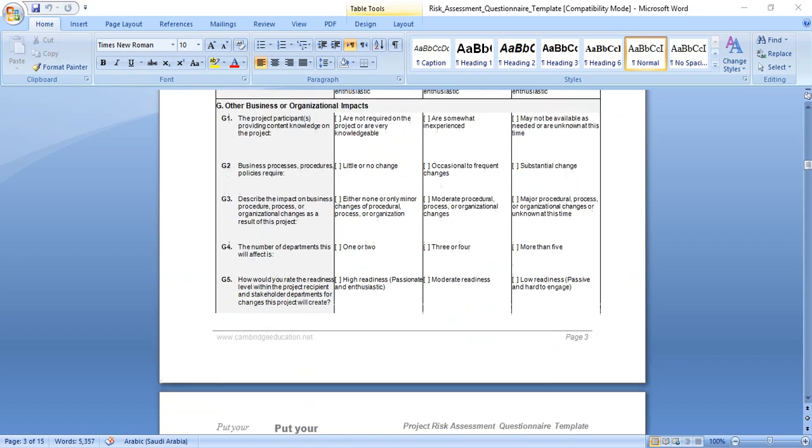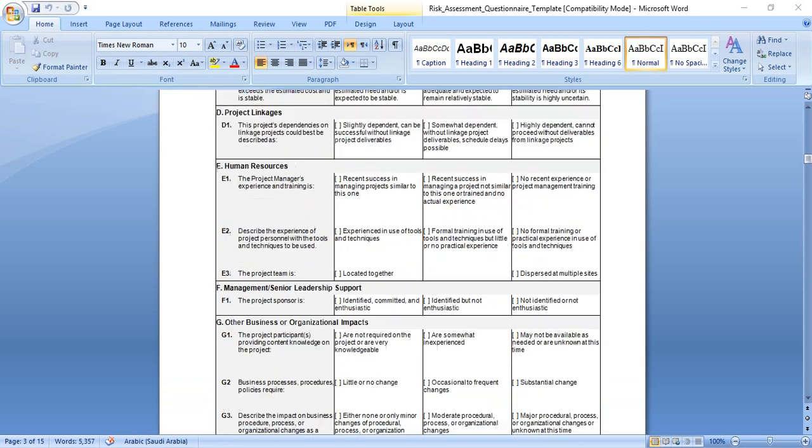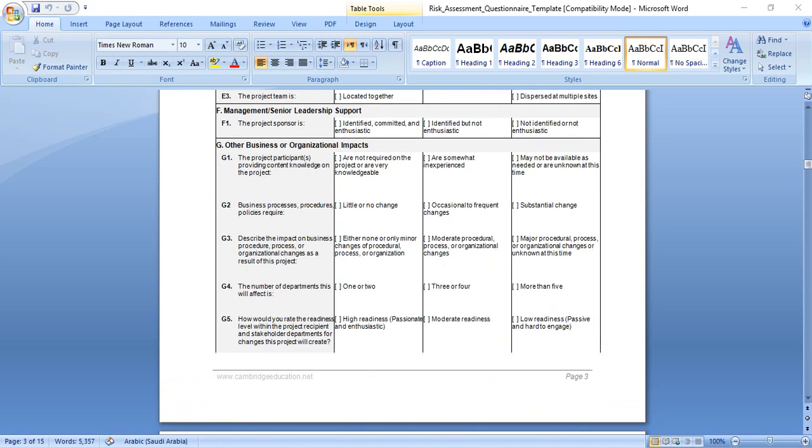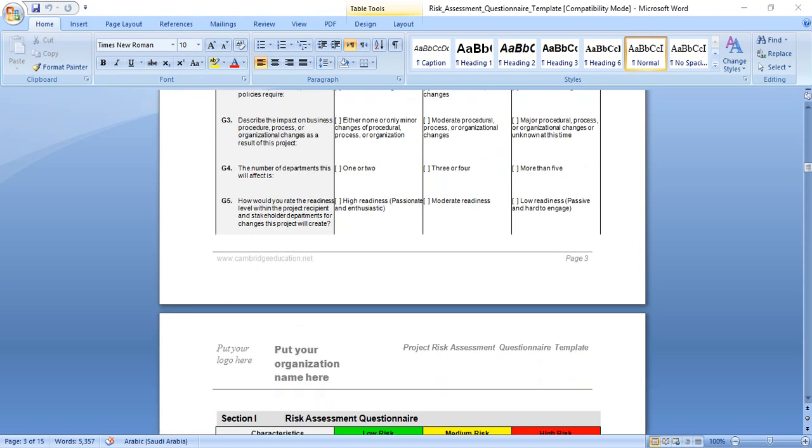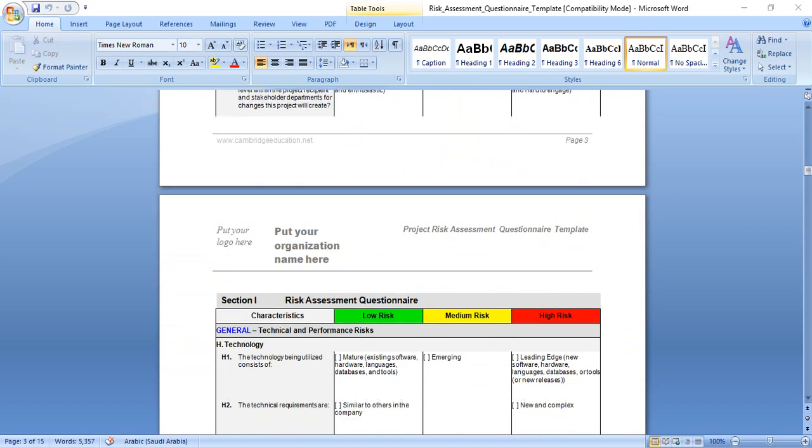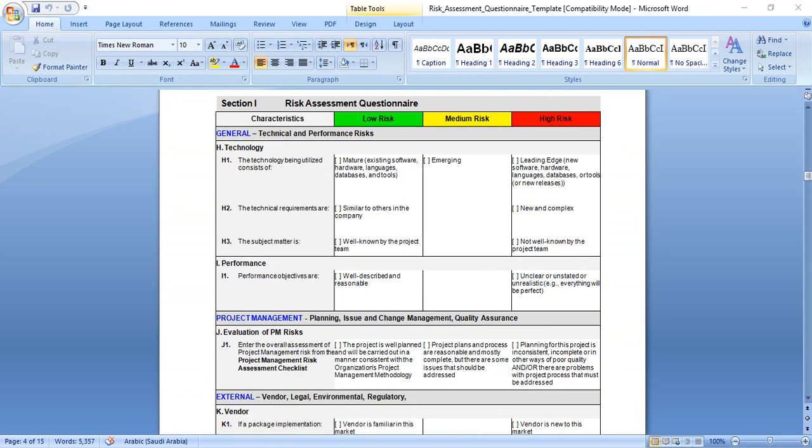And so on, you can read in the form each question and answer. Based on the answer, you can find if it's low, medium, or high risk. Take one example: the number of departments. This will affect one or two departments, low risk. Three or four, medium. More than five generates more communication time. Different, more people means more risk and more problems.